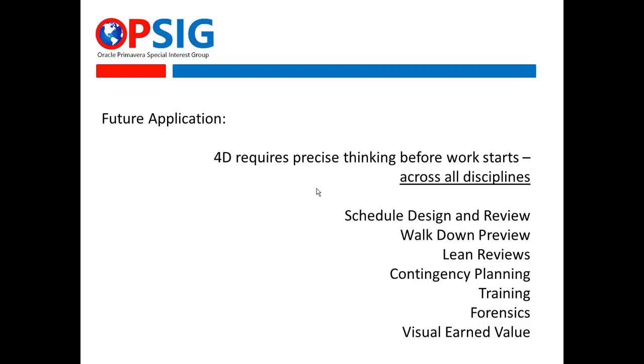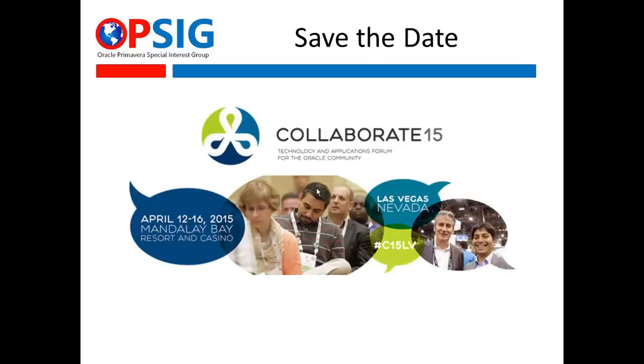And then what I haven't done, but hope to do, is some visual earned value. Simply what I mean by that is, just like we send out schedule reports, we send out earned value reports. A lot of times it's glazed eyeballs or misunderstanding. Nobody can misunderstand a video. So side-by-side video: here's what we said we would do yesterday, here's what we did. Based on the scope of work and how we staff for this, we didn't have the ability to do that. But in the future, that's something we plan to do.